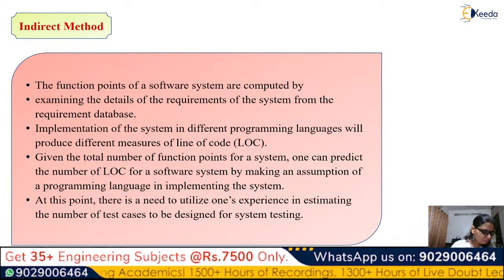Then, given the total number of function points, which we studied earlier for a system, we can predict the number of LOC by making an assumption about the programming and implementation language. So we need to utilize the user's experience in estimating the number of test cases.